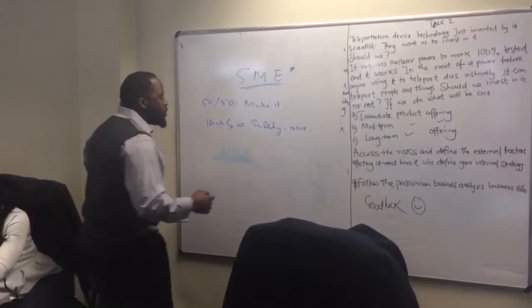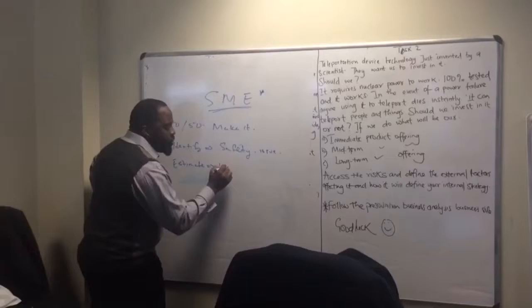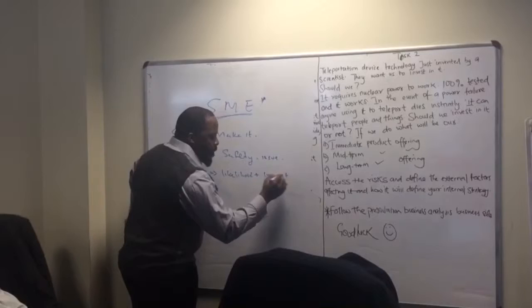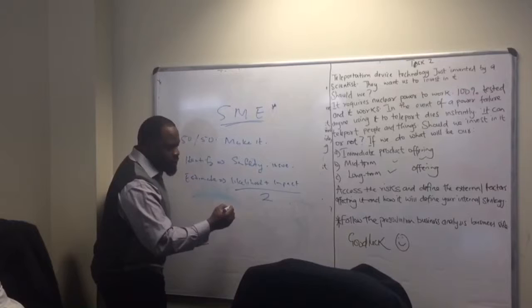So let us estimate it. Estimation looks at likelihood plus impact divided by 2. So what's the likelihood that we will make it? 50%.